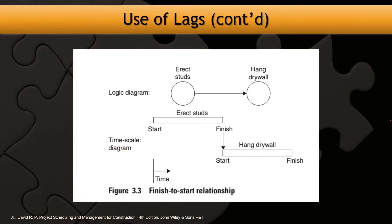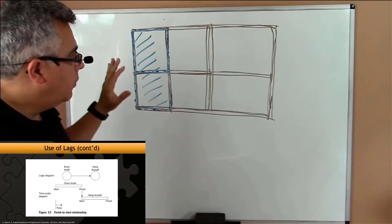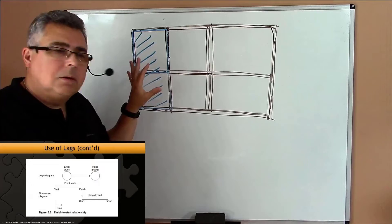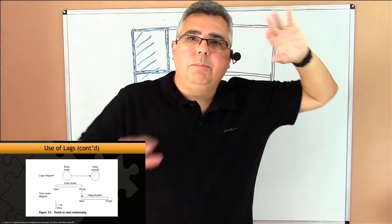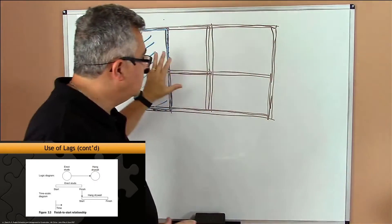You have to put the studs and then hang the drywall - that's the sequence. The most common way of planning that project is to use finish-to-start, in which you put the stud first. So you finish the frame - if you have a house or a building or several floors, you can finish the frame.